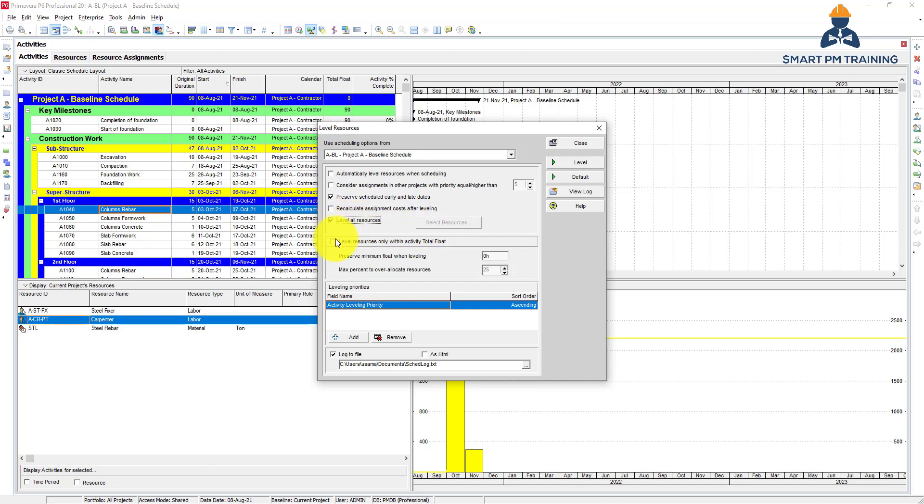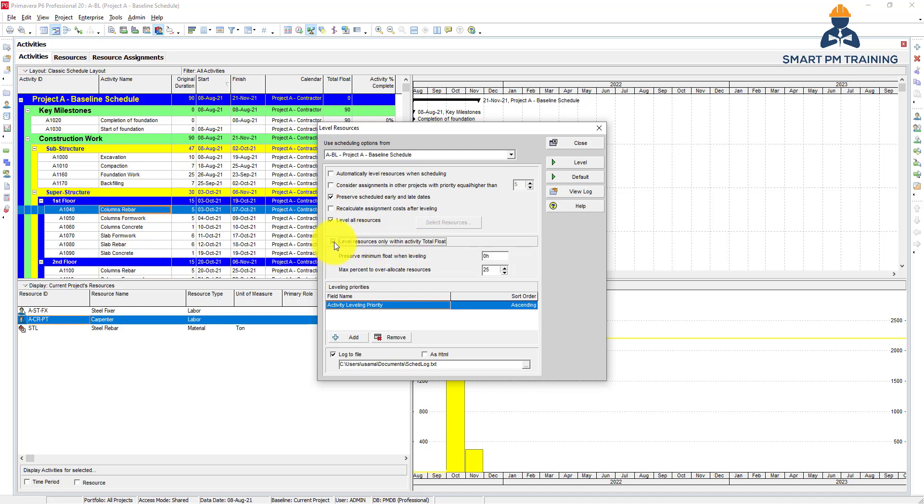Level resources only within activity total float. Let's say you have 100 labor working for 10 days duration and this activity has 5 days float. If you check that, you ask Primavera to level all resources over 15 days, not only 10 days duration. Instead of pushing or squeezing all laborers for the duration, you take advantage of the float and consider it as additional duration to level the resources.